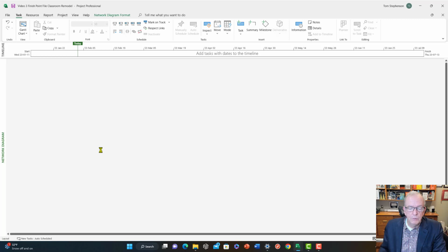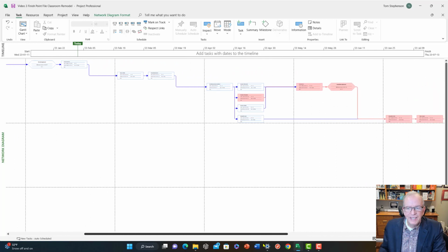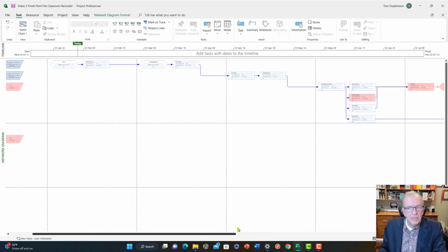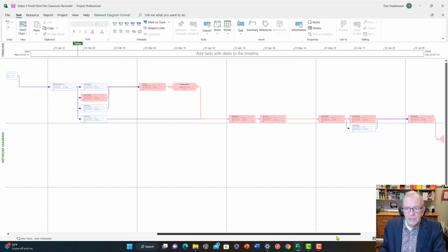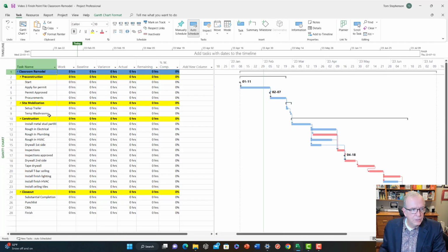We looked at that when we did the critical path, and we sort of joined everything together in this schedule. All right, and so in this particular schedule, we can see the actual linkages and the schedule logic, and what's in red is the critical activities. I have a suspicion that this isn't showing critical over here because there is a special calendar, I think, that's assigned to one of the trades. Let's actually just take a look at that.